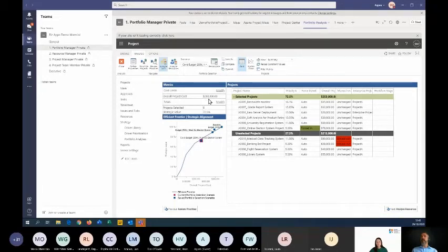So we can quickly modify our overall budget and see what the impact is. We can see we still force that project in because that's still important, but we've kicked 2 additional projects out of the portfolio because our funding to invest in our projects for the current year has been reduced.